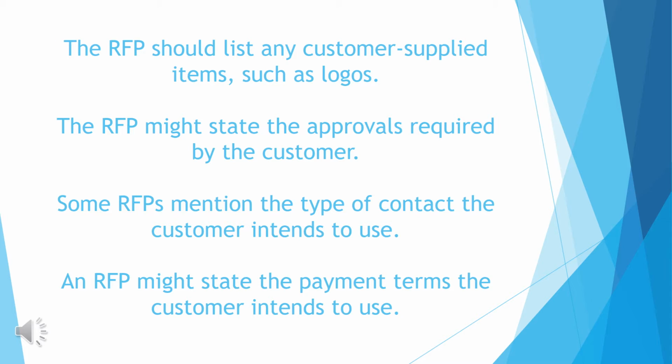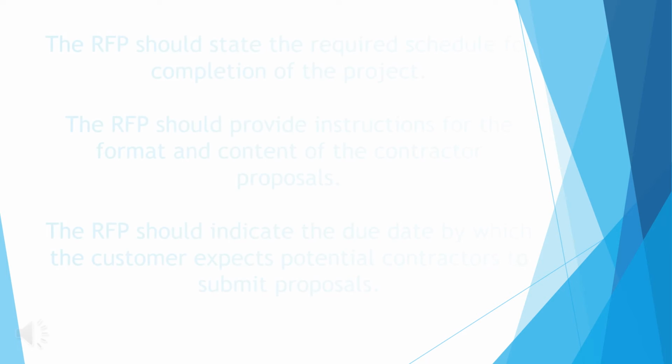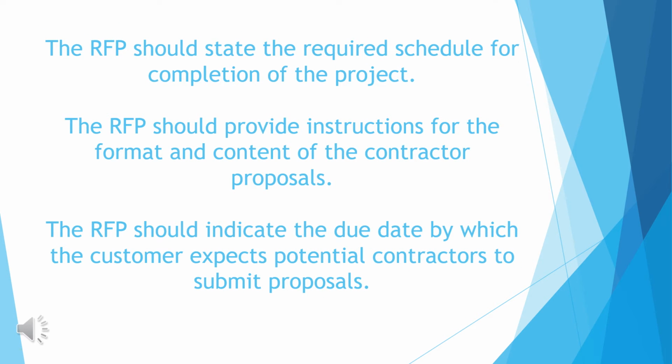Some RFPs mention the type of contract the customer intends to use. An RFP might state the payment terms the customer intends to use. The RFP should state the required schedule for completion of the project.